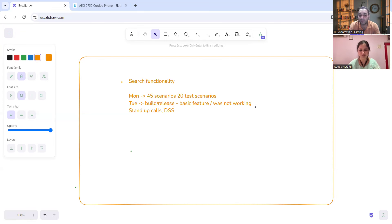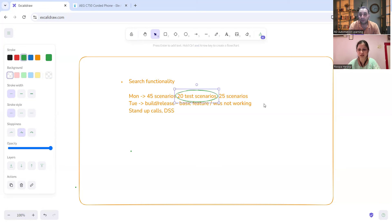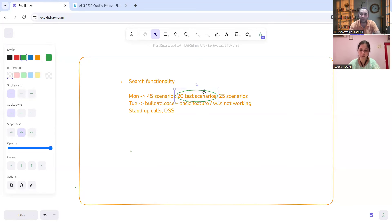You can also highlight the issue in the daily stand-up call: on Monday it was working, on Tuesday it was not. On Wednesday, if stability returns, you first test the 25 pending scenarios, but also re-run the earlier 20 scenarios via regression testing, since you can't be confident they still pass. Report to your test lead that the build was unstable and you need more time to complete testing.